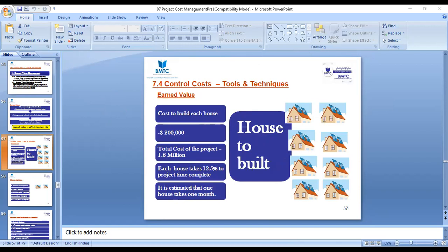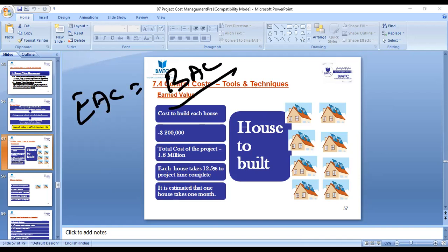Everyone, guys. Okay. Coming to the second scenario, for you to calculate your estimated completion. Second scenario, estimated completion. The formula is EAC equals BAC divided by CPI. So this is a different scenario. There is no other alternative option. You have only one option. Whether it's a good performance or a bad performance, your remaining work has to follow the current performance.